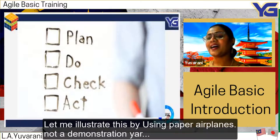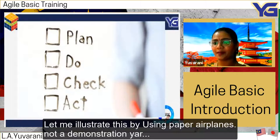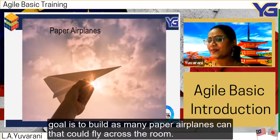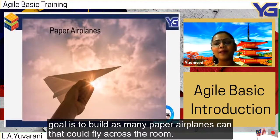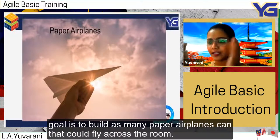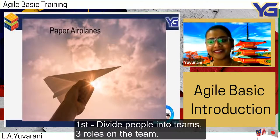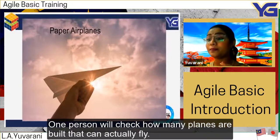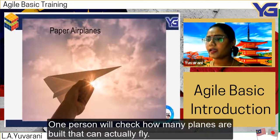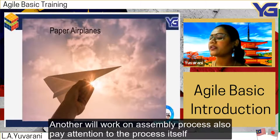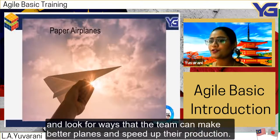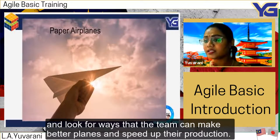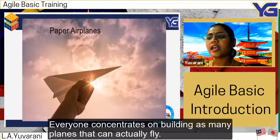Let me illustrate how to do scrum using the paper airplane exercise. The goal is to build as many paper airplanes that can fly across the room as possible. First, divide people into teams of three roles: one person checks how many planes actually fly, another works on the assembly process and looks for ways to improve and speed up production, and everyone else concentrates on building as many flyable planes as possible.